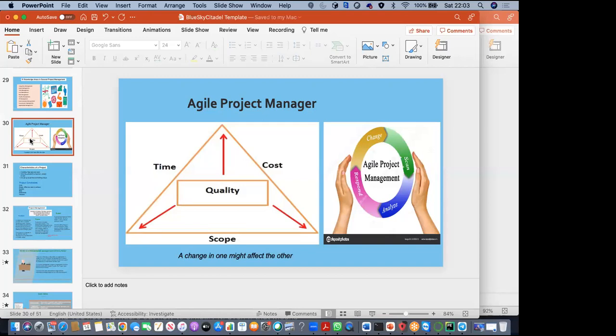The initial briefing wasn't deep enough. So who is at fault? It's the person that takes the brief. The cook. I mean, the person that gets the contract to cook the rice. That's the delivery manager, because when a brief is being given to you, you didn't ask questions. They are not being specific, and you are not either. That's it. As a delivery manager, you will be at fault because your scope was not well defined.